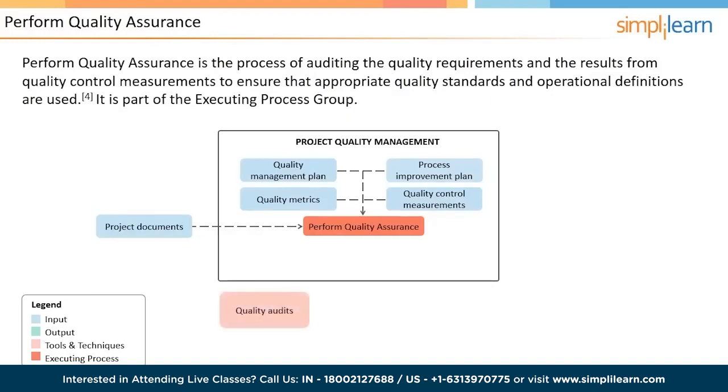Quality audit is the process to check whether the project is complying with the organization policies, standards, and procedures, and determine whether these policies, standards, and procedures used are efficient and effective. So a good audit not only looks at this compliance, but also for the new lessons learned from the current project that can help make the future projects better. Process analysis involves using the lessons learned from doing the initial few work to make the remaining work more efficient.